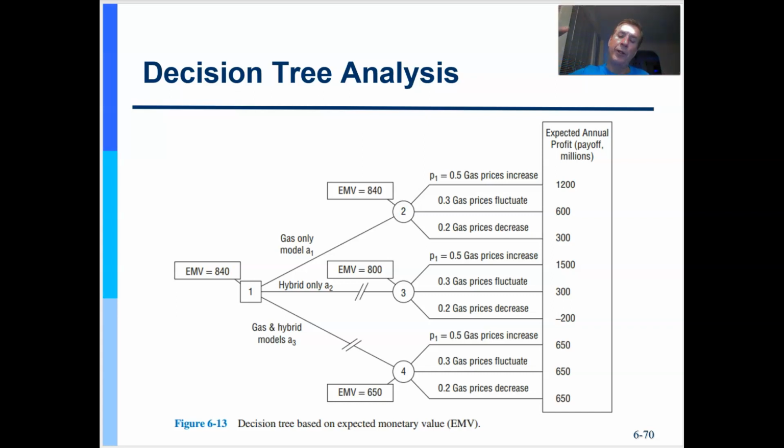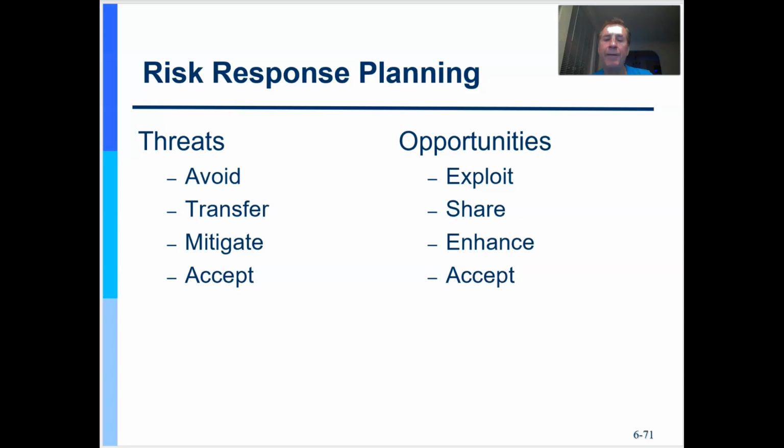So you have this tree structure, and what you have is your steps along the way and the probability and impact of each. Once you lay out your pattern of steps, you add probability and impact for each and work backwards, multiplying to see which decision. So you're using expected monetary value, which is probability times impact, in the form of a decision tree. Once you've defined your decision tree, you do the numbers, adding probability and impact, and multiply them back to see which decision you should make. That's how that would work.